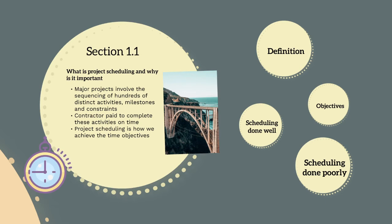On top of this, activities will be affected by external events that you have no control over, such as the weather. Working for a contractor, a client is paying you to complete a job within a specified time period, potentially meet a series of interim milestones known as separable portions, and completion dates are contractually bound. Any delays in completion of the project will incur liquidated damages and penalties.